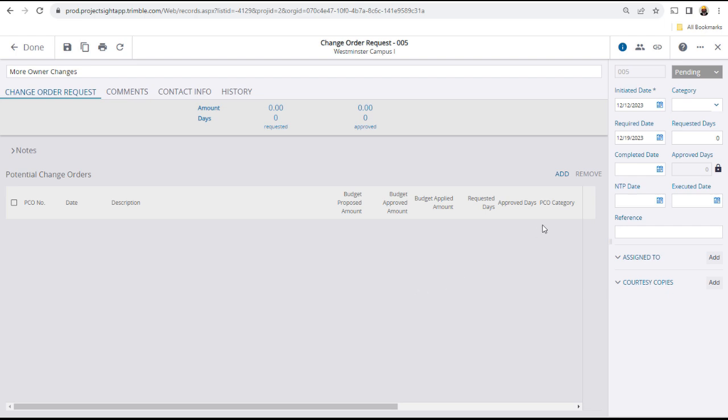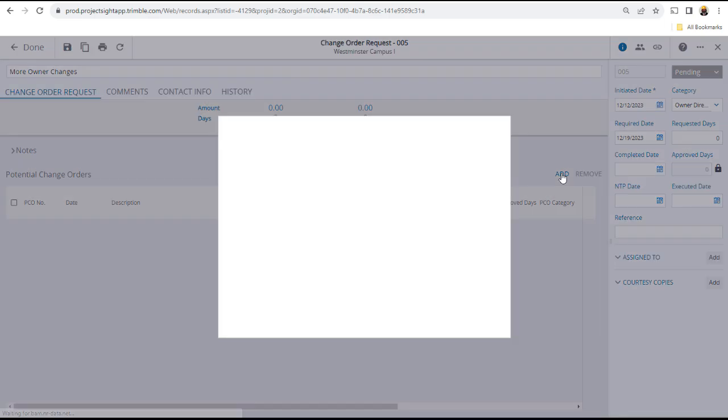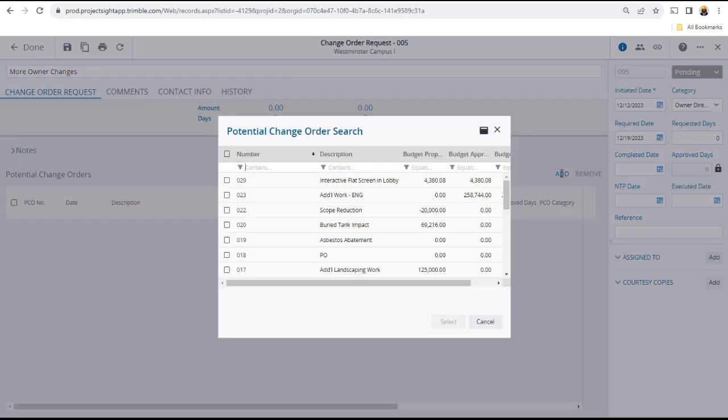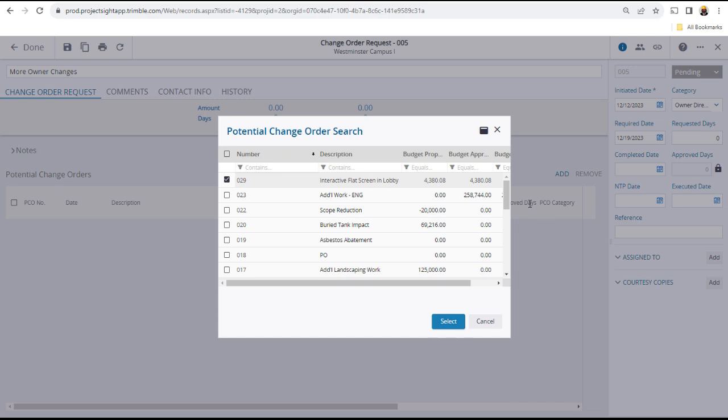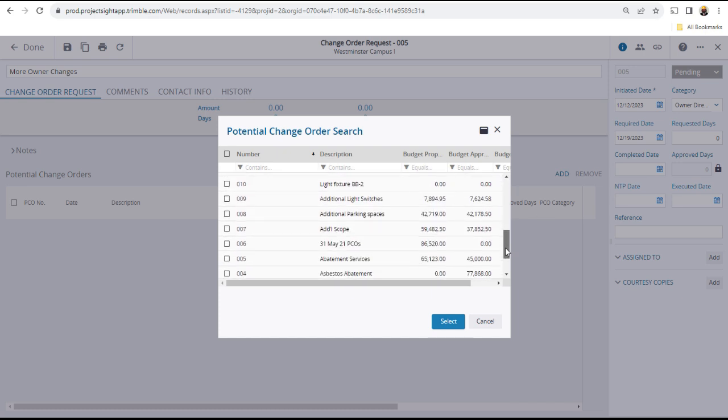First, in the right panel, select a category. Click add in the main panel, which will open the potential change order search window, where you can locate and select the PCOs that you want to be part of the change order request.